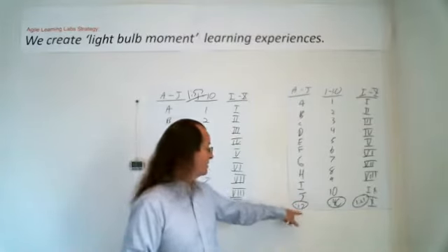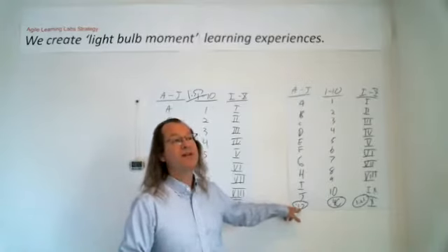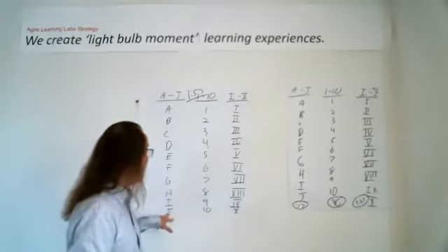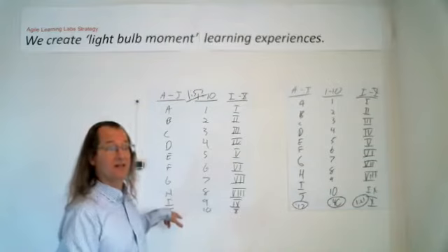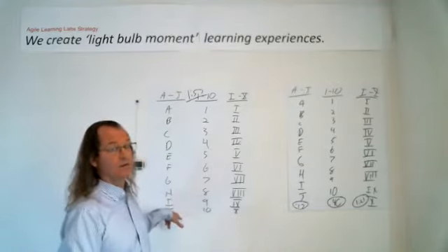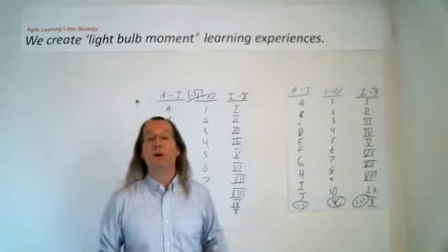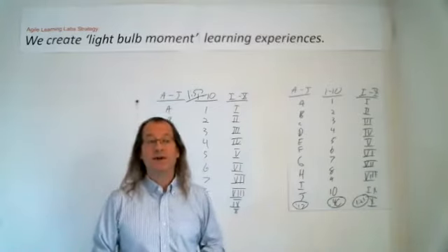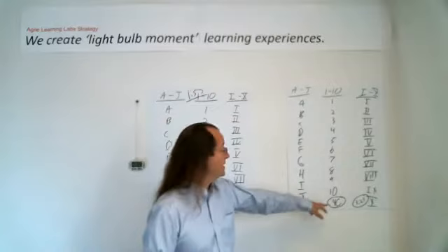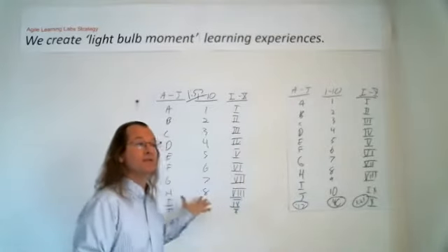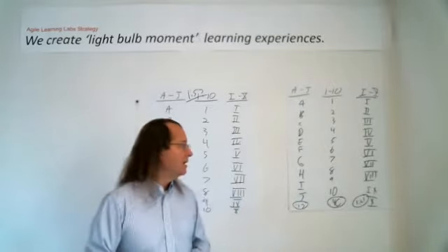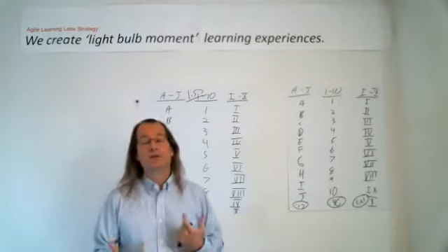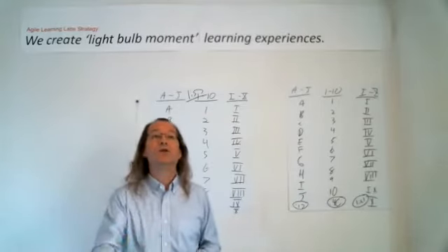So, okay, great. But I think the bigger win is that by serializing the work, we're getting things a lot sooner. So here we got our first deliverable 17 seconds in versus 1 minute and 55 seconds in. Wow, right? Time to market is money. And that's a huge difference, 17 seconds to 1 minute 55 seconds. Similar for our second project, right? 40 seconds versus 1 minute and 56 seconds. And so there's a huge value in getting these early deliverables sooner.